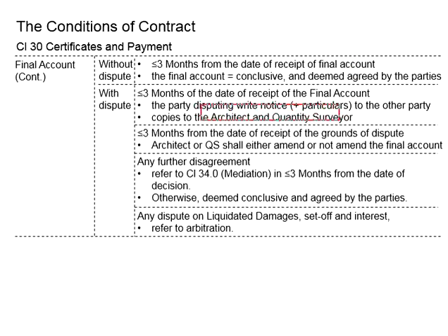Now this has been made known to the architect, quantity surveyor and another party. Everyone in the loop knows about it. Then within 3 months from the ground of the dispute, that means within 3 months of this written notice, the architect and quantity surveyor shall review the final account again. Now there is particular submitting by the disputing parties. The architect and quantity surveyor will look into the particulars and determine whether it is necessary to amend the final account. The final account now can either be amended or not amended.